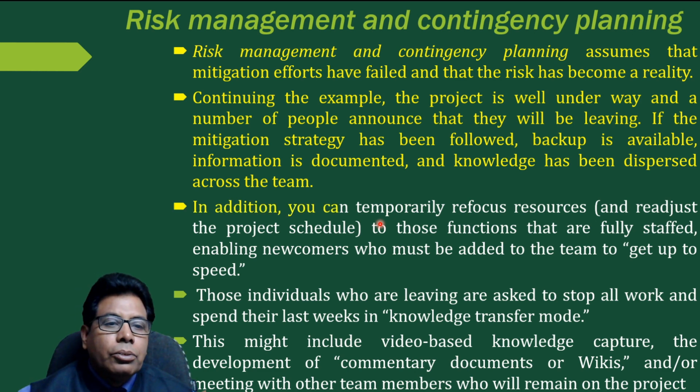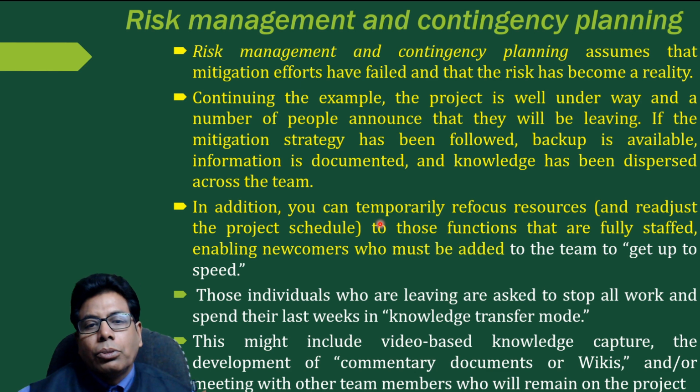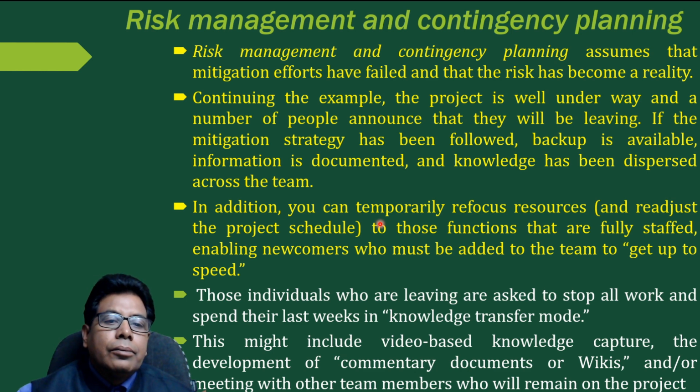So in addition, you can temporarily refocus resources to those functions that are fully staffed. So the functions that are fully staffed, they can do more work and allow the newcomers to take time to gain speed.